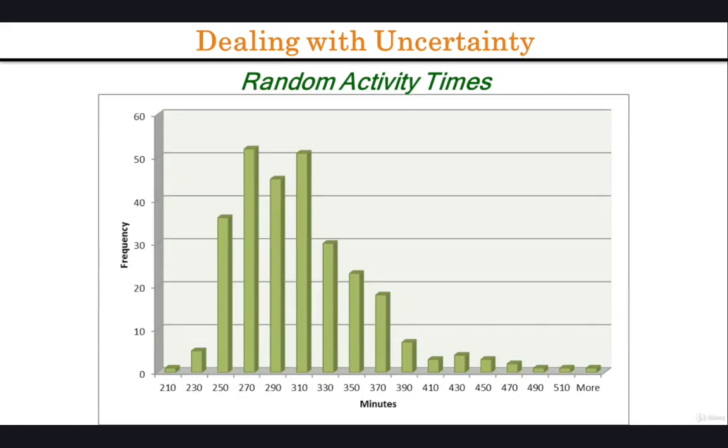This figure here shows the activity durations for a sample of cardiac surgeries in the operating room of a large hospital. We observe that there exists a considerable amount of procedure variations. Moreover, we observe that the distribution is not symmetric. Activity durations that are more than double the mean duration can happen. The distribution has a long tail.